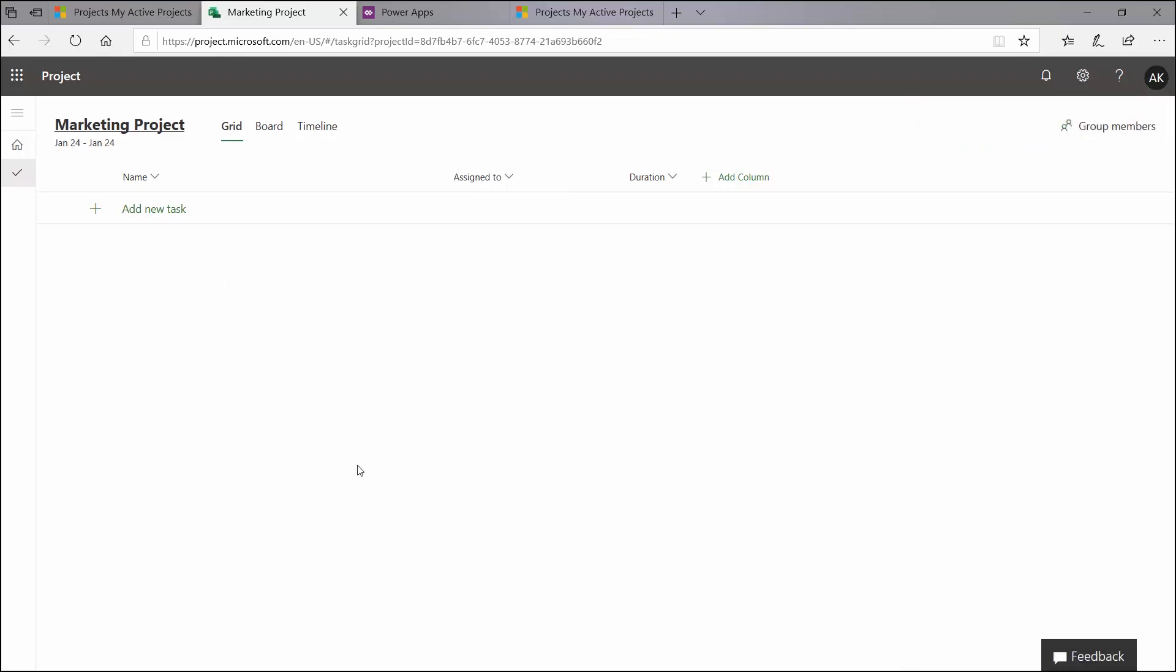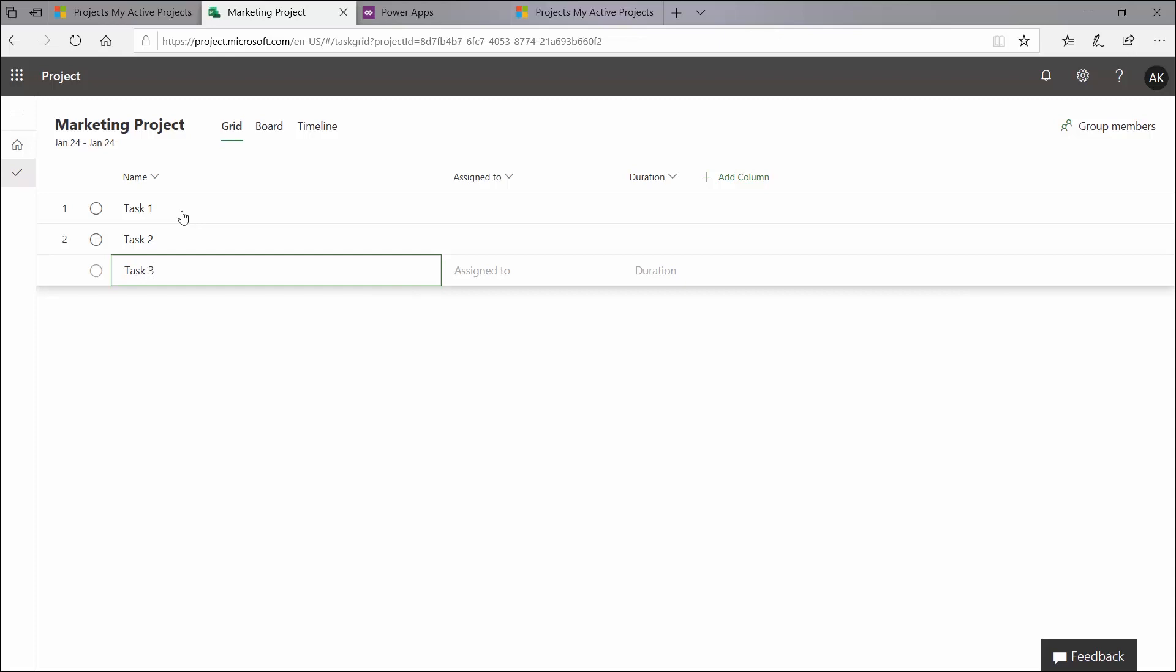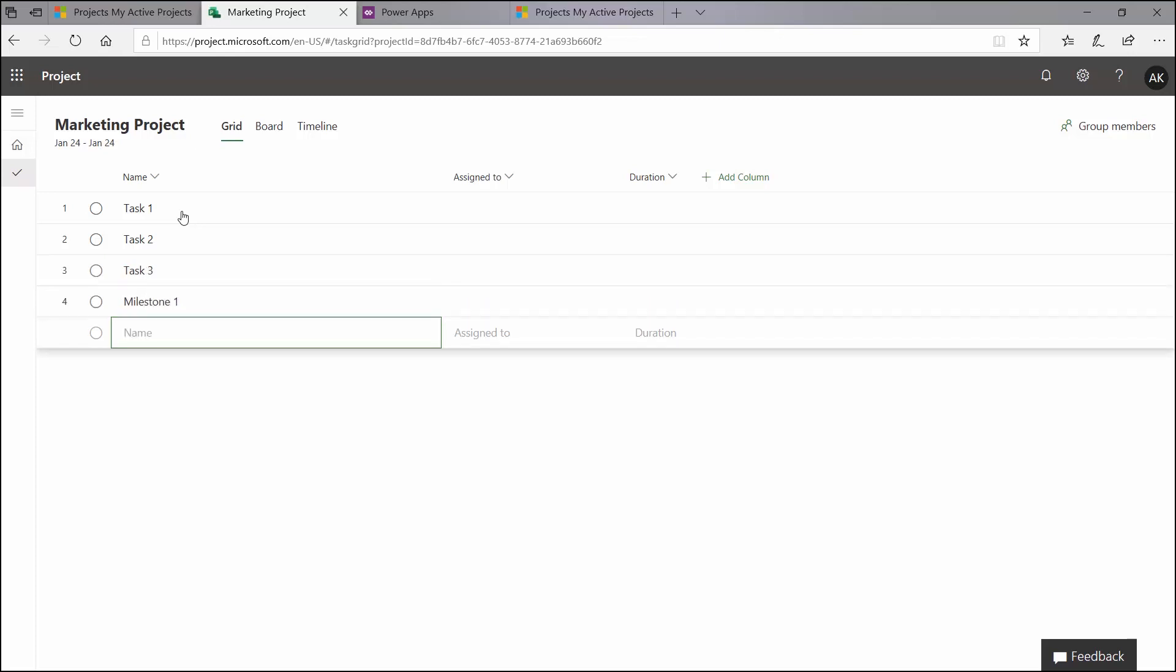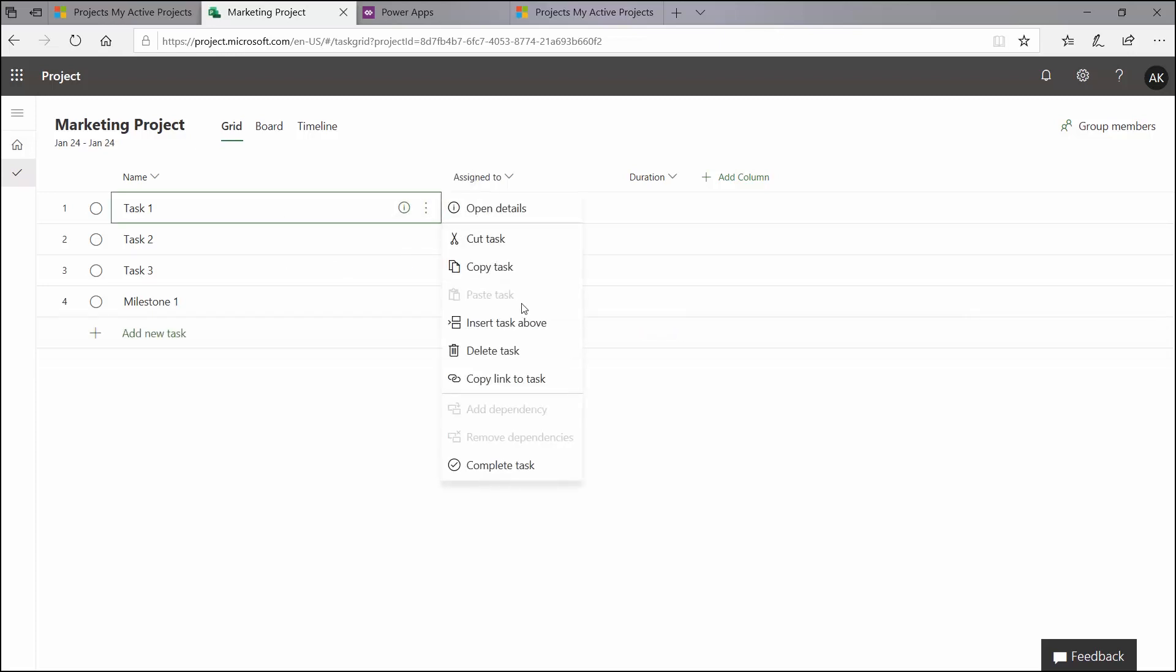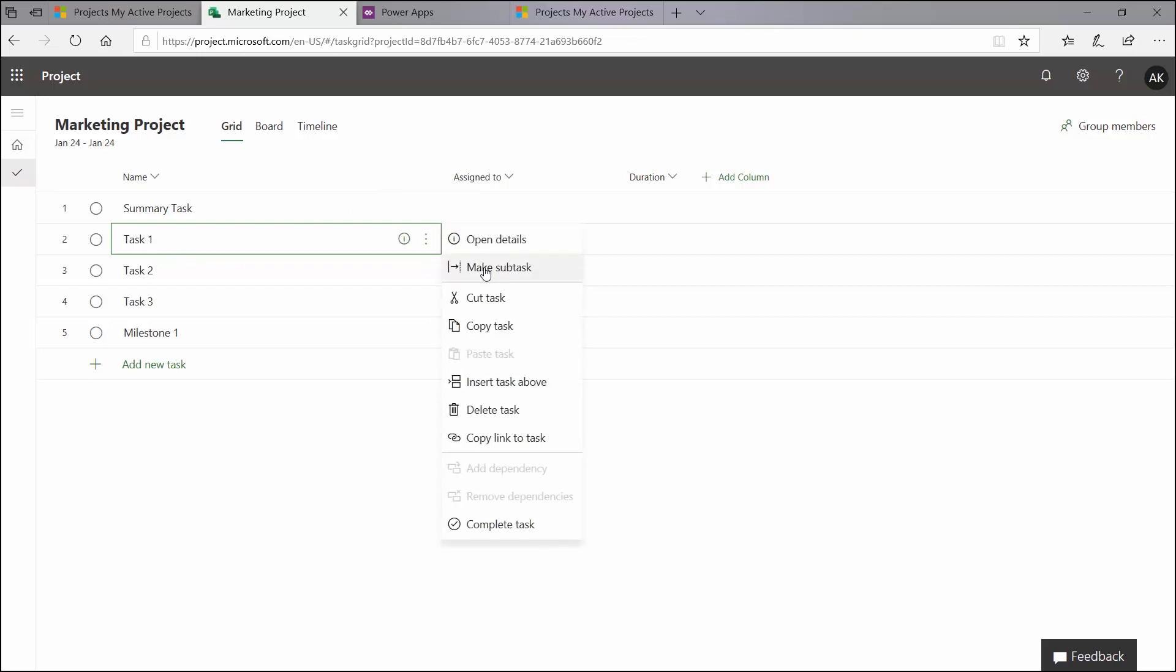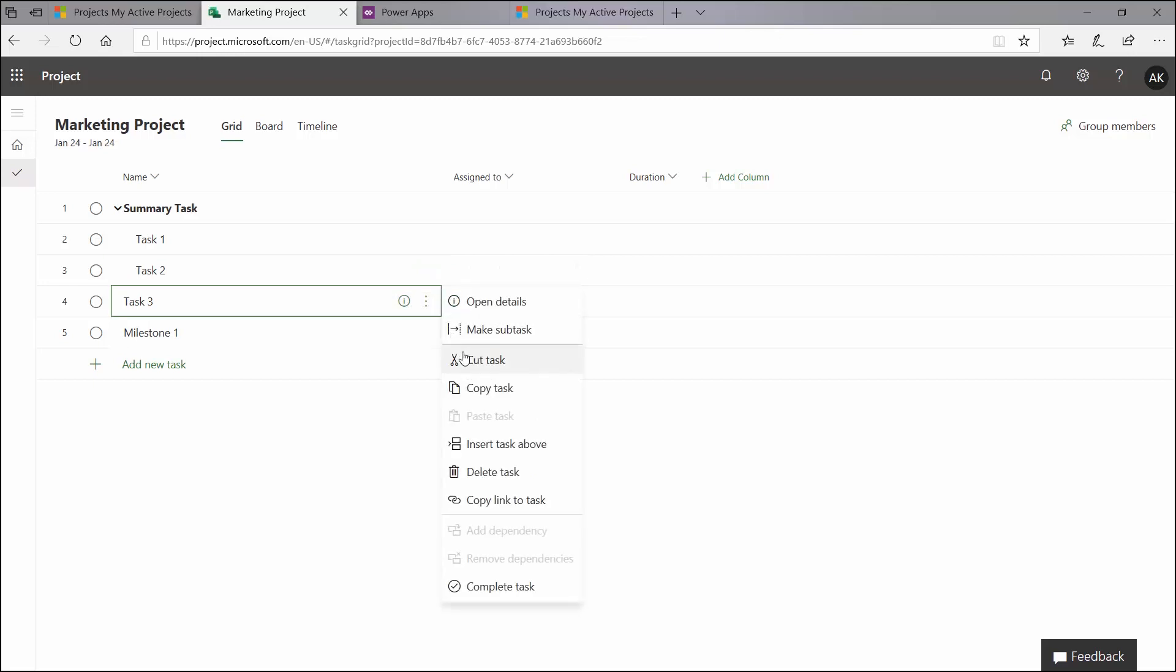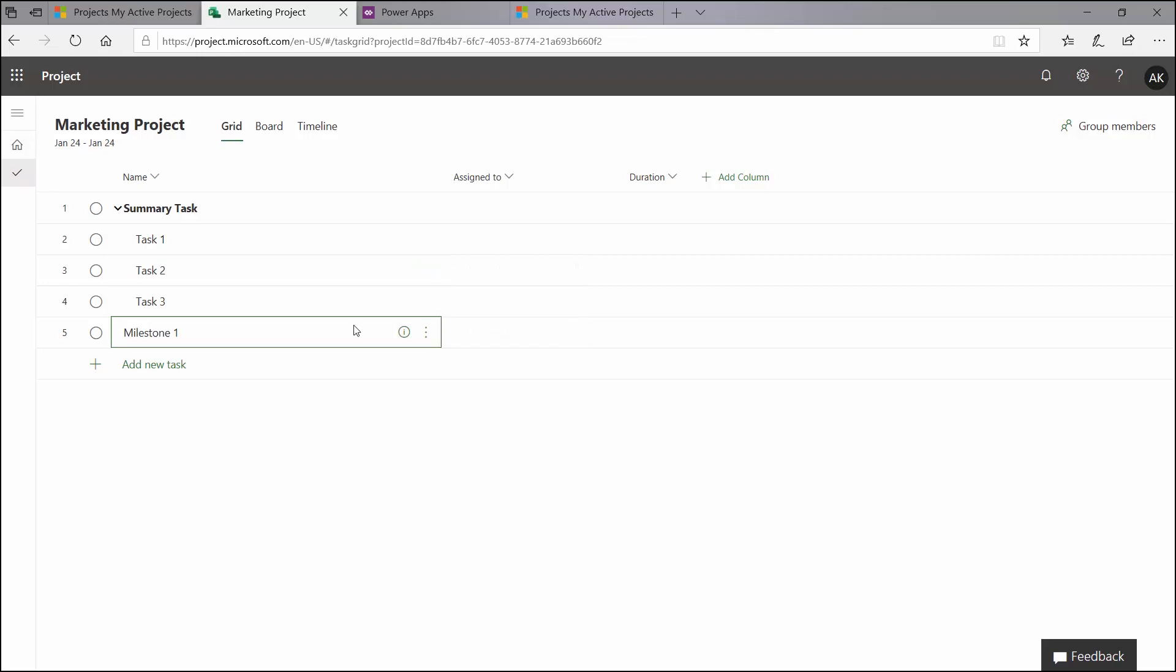I'm going to go ahead and close this. And so right now, I am in my grid view. Here is where I can see the different tasks that I'm going to create. I am just going to go ahead and create a very basic outline for my schedule here, which has a couple of tasks and one milestone. You can promote different tasks. I'm going to insert a task above it, and I'm going to insert in my summary task. And any of the tasks underneath it, I'm going to make it a subtask of the task above it. So you can see once I do that for all of them, they all go underneath of the summary task here.